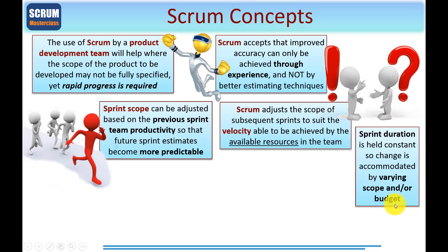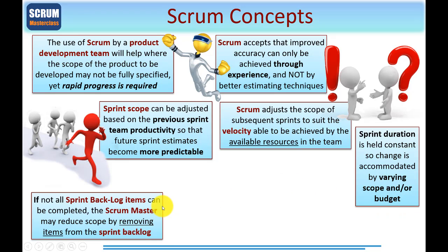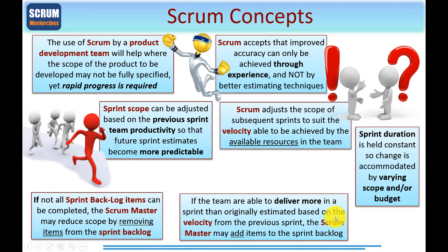We'll be covering that in detail in later modules. If not all of the Sprint backlog items can be completed, then the Scrum Master or maybe the Product Owner may reduce the scope by removing some items from the Sprint backlog. Those removed parts may be added back into Sprint planning for the next Sprint, or they may be modified in some way. On the other side of the coin, if the team were able to deliver more in a Sprint than was originally estimated based on velocity from the previous Sprint, the Scrum Master may add items to the Sprint backlog.